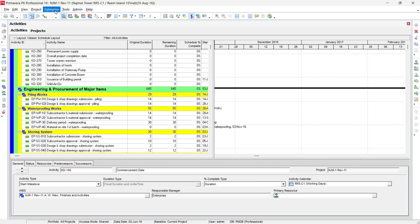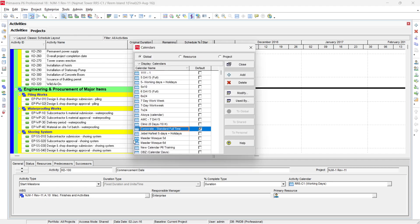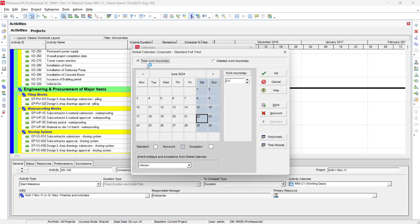To do this, go to Enterprise and click Calendar. In the Calendar dialog, you see Project, Resource, and Global options. Select the Global calendar — the one marked with the selected button is the active global calendar. If you click Modify, you will see total work hours showing Monday to Friday as working and Saturday and Sunday as holidays. Selecting any Saturday or Sunday shows zero working hours, while selecting any other day shows eight working hours.